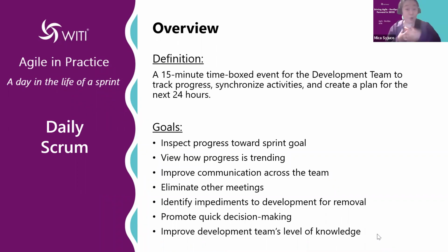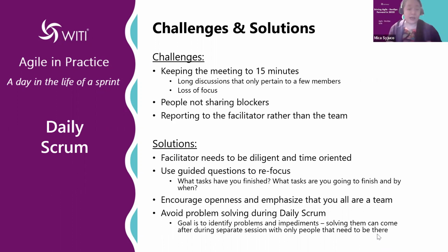Or it can be like, oh, I'm Mica, right? And then maybe Becca is working on a module that is dependent on mine and I'm holding her up. So what can we do to kind of reshuffle the work? Or maybe do I help her first? Or vice versa. So that kind of thinking happens in those 15 minutes. I'd say, yeah, you know what? Okay, let's talk about this after the fact. Let's collaborate and say, what can we do to help you so that we get to the overall goal by the end?